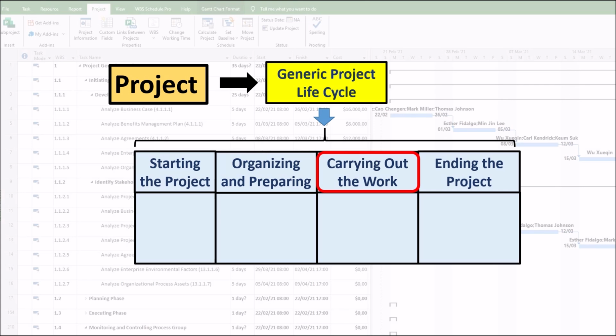Finally, once there is an approved end product, the project can be formally closed and evaluated. This final fourth stage involves delivering the project product to the customer, redeploying project resources, and conducting a post-project review to learn from both the successes and the mistakes to capture lessons learned in order to take that experience forward to the next project. However, in reality, the project lifecycle should be more detailed, with phases and subphases. Using multiple phases may provide better insight to managing the project.